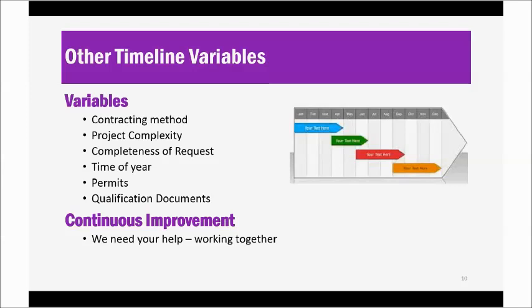If you do not have your permits, then we have to add additional language to the contract, then consider delaying the bid opening until we get those permits. In rare circumstances, we can discuss doing opening bids without them, but like I said, that's rare. So please make sure you get them all, and that the contract specialist is aware of the permits and the conditions that you may have.